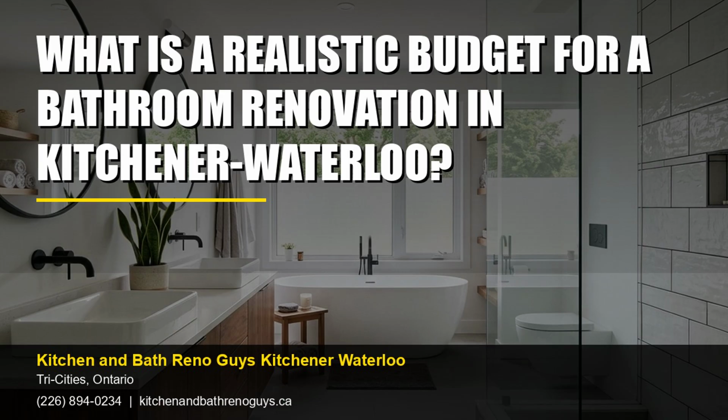On average, homeowners in the region can expect to spend anywhere from $10,000 to $25,000 for a standard bathroom renovation. However, opting for high-end fixtures and finishes can drive the cost upwards to $50,000 or more. Engaging a reputable bathroom renovation contractor in Kitchener can help you navigate these options effectively.